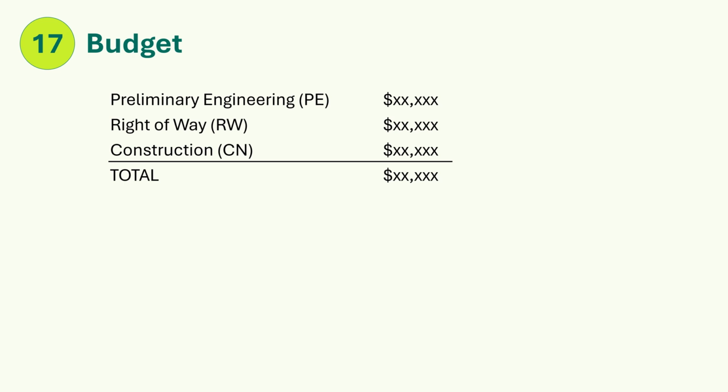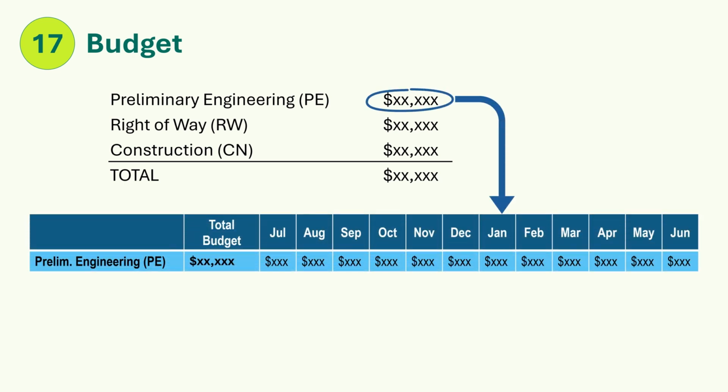Initially, you may have only been authorized enough funds to achieve one phase of the design process. Additional funds may be programmed to become available later. Some future funding may rely on applying for and receiving grants or from other funding sources. Document any ideas in your PMP for an aging spend plan, which is how much of each budget you think you might spend month by month.